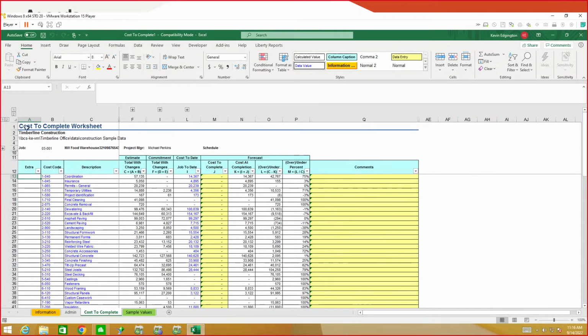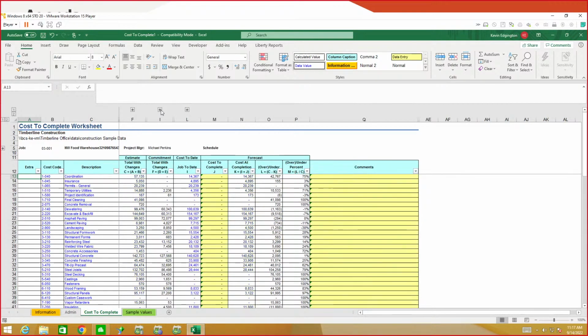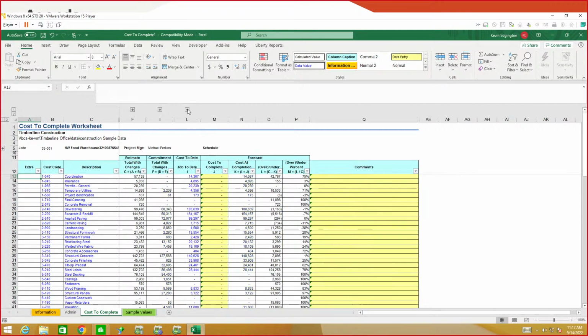So basically, same type of thing. So what company, what's my folder, what job, what information, who's the project manager, there's each one of my cost codes. There's my estimate, but they use these little summary things where I could say, my original plus approved is my revised. Here's what I've got committed on the job. Here's my cost to date on the job. Committed there again could kind of show me my original and what approved PO changes have I made and so forth. My cost to date.